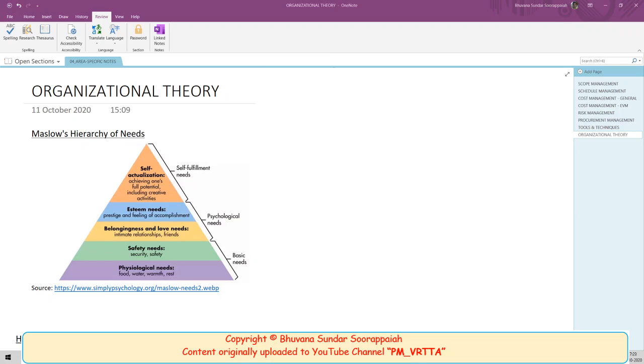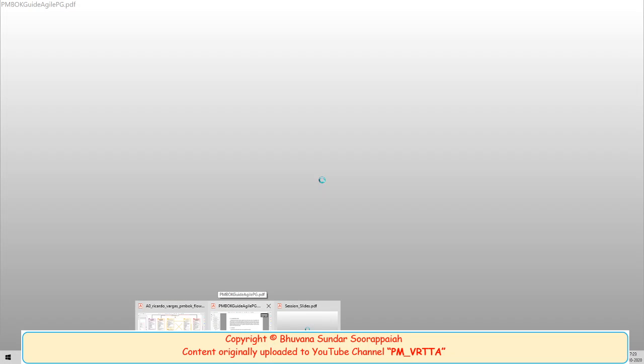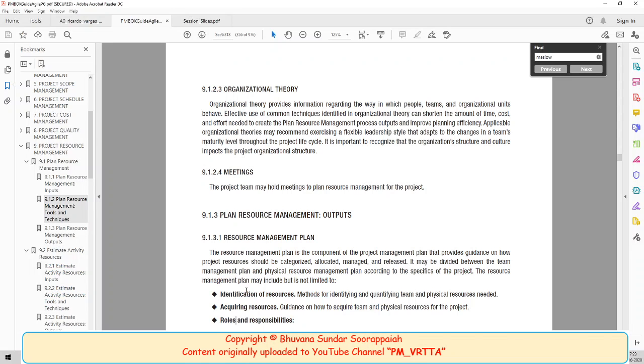Maybe if you have also opened the thing, I know the page number, I can also tell you. It says most likely plus optimistic plus pessimistic together by 3. I know that's a simple average. But what I learned was pessimistic plus 4 times most likely plus optimistic by 6. That is the right formula you should use in the PMBOK examination ideally.